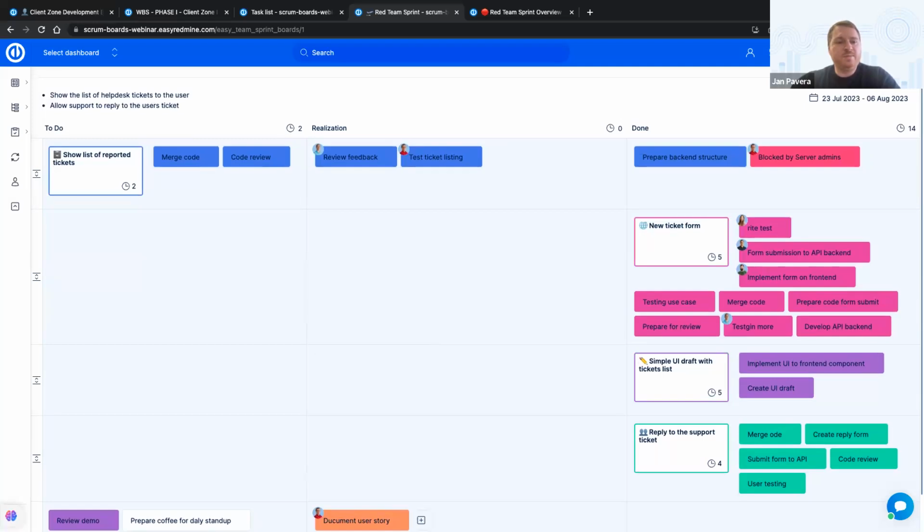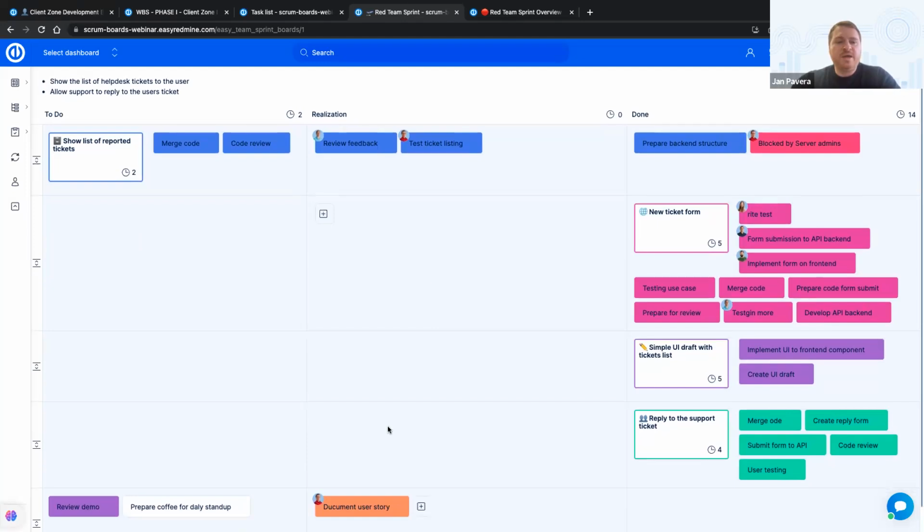So in the end, just 3 columns represent the status of the work, not the workflows. And the workflow, or let's say pieces of work, are visualized by the sticky notes. Because of the transparency, shared responsibility, and preventing rigid workflows or less cooperation.